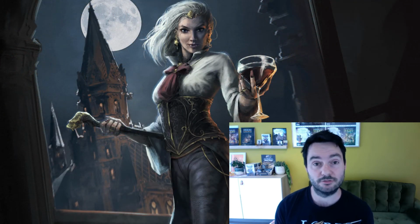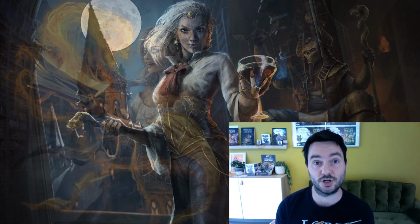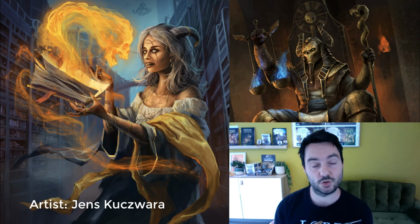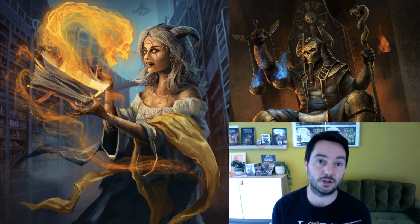Even though the digital file of the book is going to be ready this year, that doesn't mean that we can very quickly ship the physical goods straight after that, because it takes several months to manufacture, and then again several months to transport the goods via ocean freight to the other side of the world. And really, our experience right now from last year and also this year with COVID, not only has it become more expensive, but it also just takes a long time. We're going to keep you posted on however things are going to go. Every time we have new information, we're going to communicate it as clearly as we can through the Kickstarter updates.